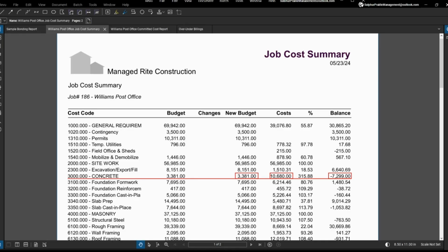So what's the difference? We can see what makes each of those numbers on the WIP report. This is a job cost summary for the project. A job cost summary is a report that shows each line item that adds up to the current budget, current cost to date, and the projected cost to complete. We can see every line item with a budget and compare it to the cost to date.